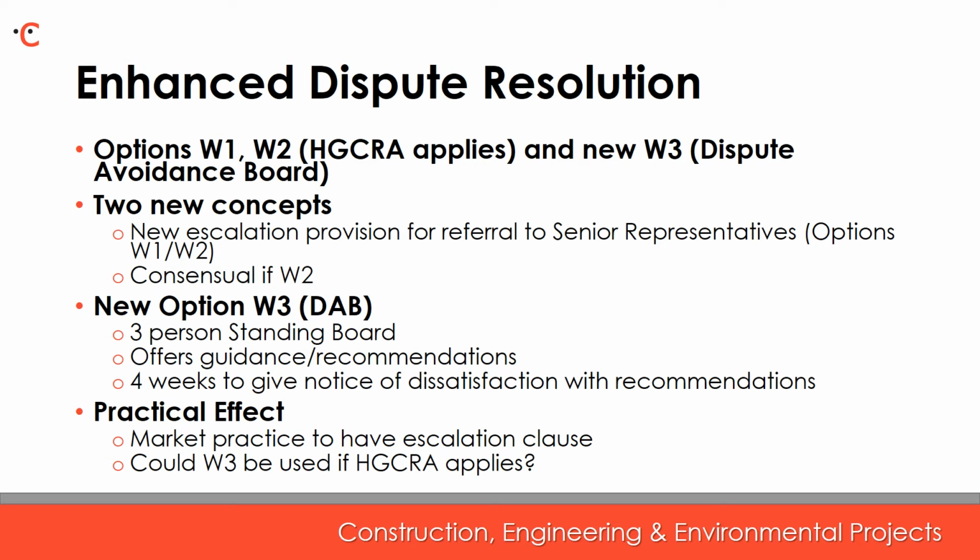As I said earlier, the adjudicator's contract has been changed so that it can be used to appoint board members, and it's been renamed the Dispute Resolution Service Contract. Under this, the client, contractor and project manager appoint a representative who will make up the Dispute Avoidance Board. That board is empowered to visit the site and be familiar with the project from the outset, making recommendations and proposed solutions in order to resolve disputes.